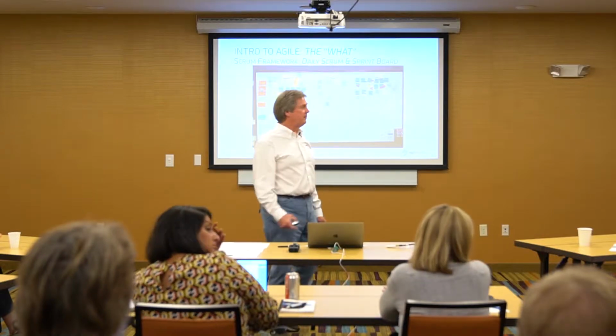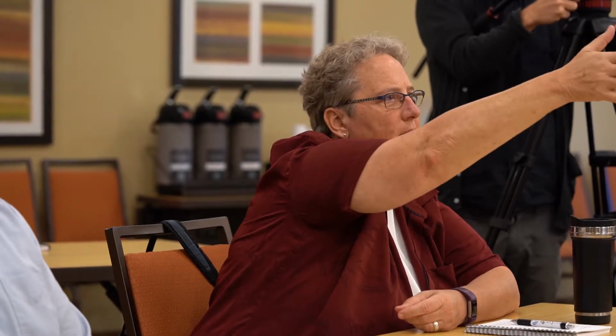Yes, Janice? Who comes up with what's going to happen in that first column? The development team. So the whole team comes together, and they then brainstorm what they'll do. Yep, and then individuals will go up and they'll select which of those tasks they are choosing to do. It's an opportunity where they can either leverage their existing specialty or, hey, I don't know how to do Python programming. I'm willing to learn if somebody can teach me. Yeah, well, let's pair you up with this person and you guys work together, get them started, so that's another way of handling that.